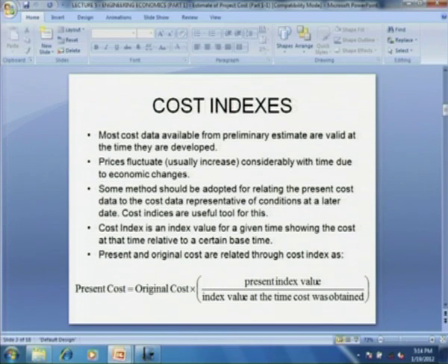Before we go to that, let us see why we have to see all these estimates. In the first place, we have to pay a significant amount of money or fees to the consultant to get these estimates. So, before we go for a detailed estimate, we have to make sure whether the project is sufficiently profitable or sufficiently promising for investing that much money to get the total project estimate.